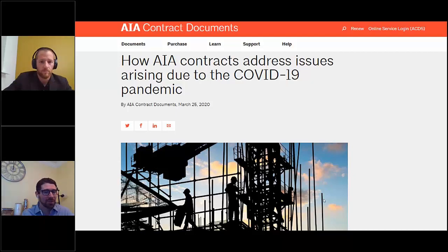I would agree that's probably the easiest of the potential scenarios that are happening right now, and it'd be difficult to imagine a scenario where that doesn't trigger a valid delay claim, where the contractor literally, it is illegal for them to perform work right now. They cannot go to the job site. So something, a mandate, a proclamation, a new law has come into place and precluded them from doing their job. I would imagine in all likelihood that would form the basis of a valid delay claim.